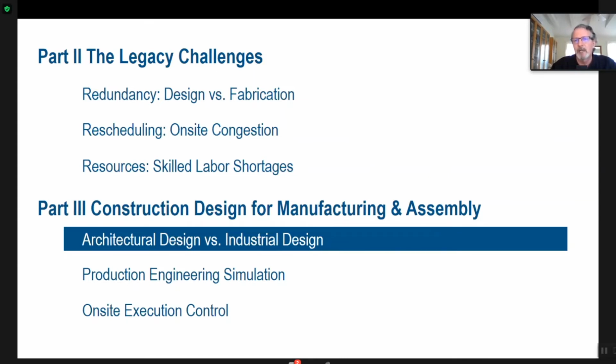The sheet welder, as an example, rarely makes sheets bigger than 10 or 12 feet. They happen to be around 9 or 10 feet. They happen to be the same as a truck size. So making sure that you can make the product in multiple factories by having the owner pre-negotiate these relationships is really important. So it's really a contract issue. It's a relationship issue. And then finally, you can do it with different technologies, but technology is really the last issue.